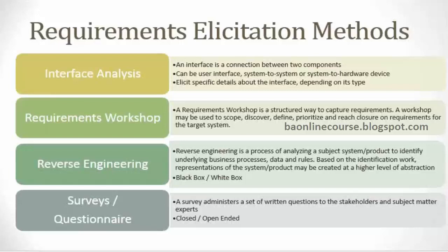Rather than capturing the requirement, and then when you go to the development team they say this cannot be done in this particular way, then you have to go back to your SME again and rework on the requirements, right? All this can be avoided if you actually have a JAD session. Because you have all those various perspectives coming in, you can finalize and freeze the requirement right at that meeting itself, right? That way you save on time.